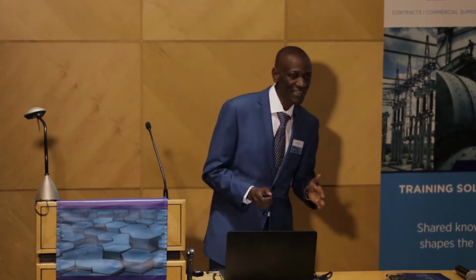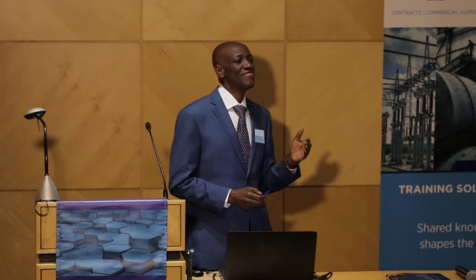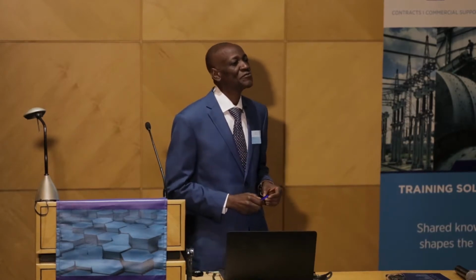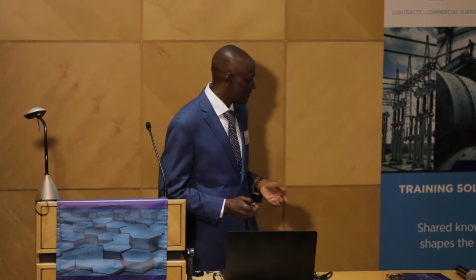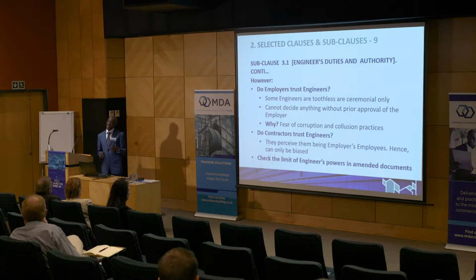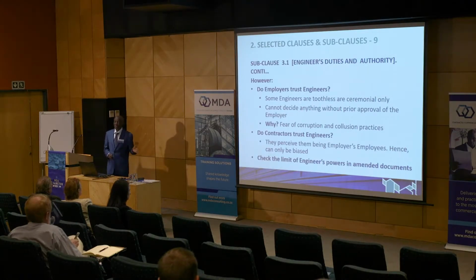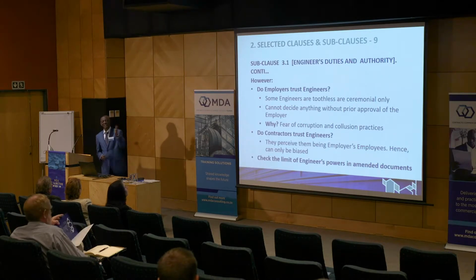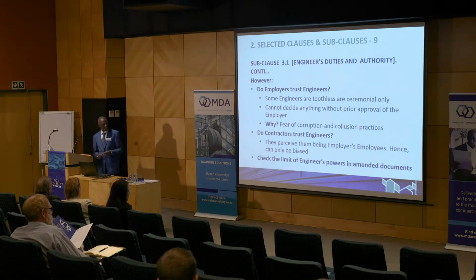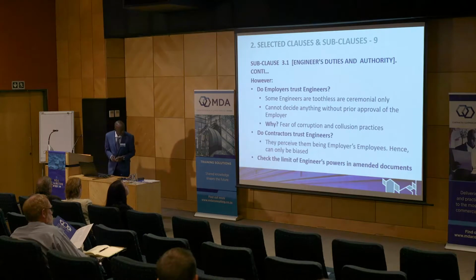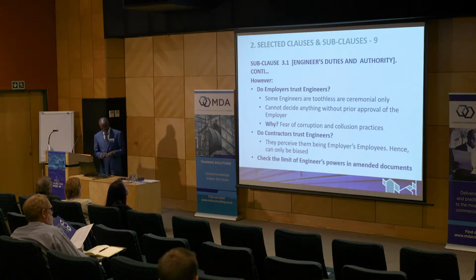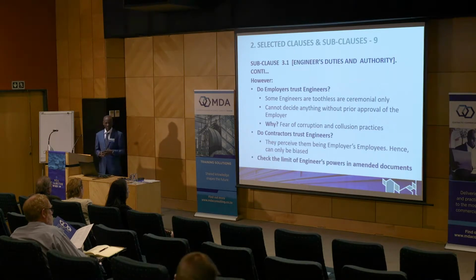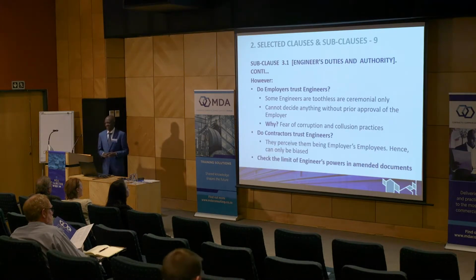But the current situation is that the engineer is perceived to be the employer's personnel. And at the same time, even if he is the employer's personnel, the employer himself does not trust the engineer. So as a prudent contractor, you should check in amended documents, like the appendix to tender and the particular conditions of contract, the limit of the duty of the engineer.